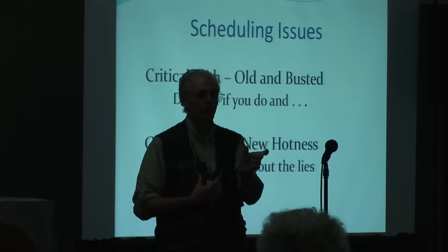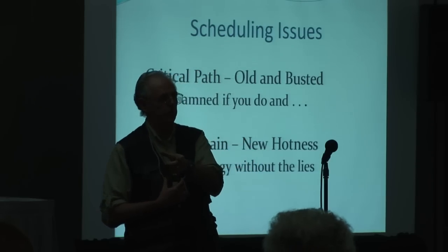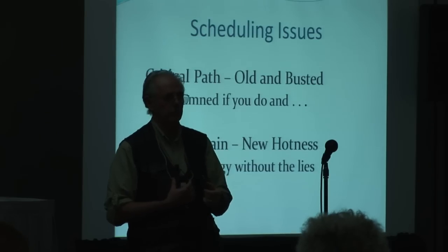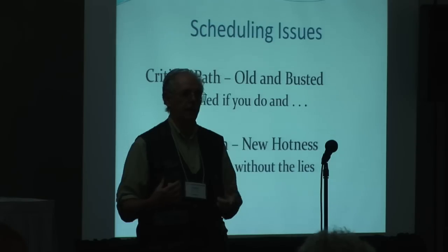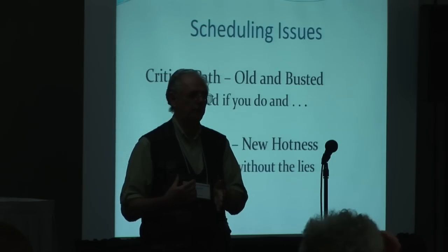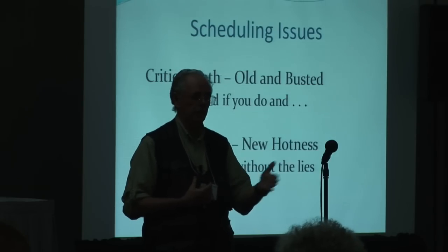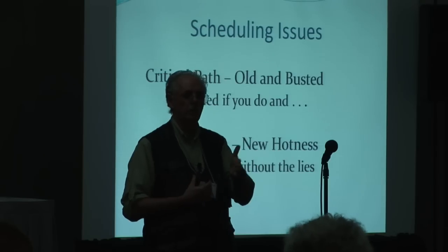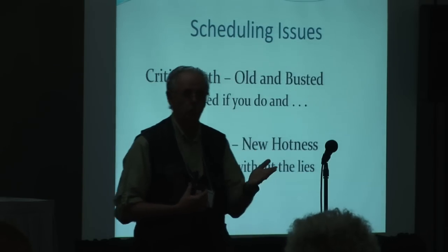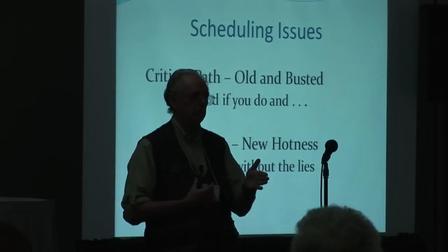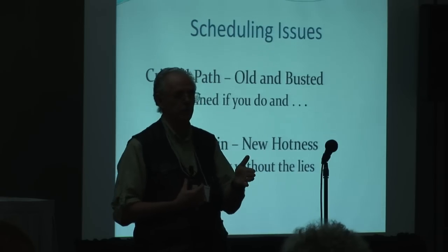And then you figure what the pad would be, and you add all those pads up through what would be the critical path if you had one, if you're using critical path instead of critical chain. You add them all up, and you get one huge task that you put at the very end as a pad, and you cut it in half. And you cut it in half because, in theory, sometimes you're going to be under, sometimes you're going to be over. But you're still probably not going to need all that pad time. So what happens? Because people will sometimes make their dates. If they're realistic dates, they should make them 50% of the time. Depends on how good you are at estimating.